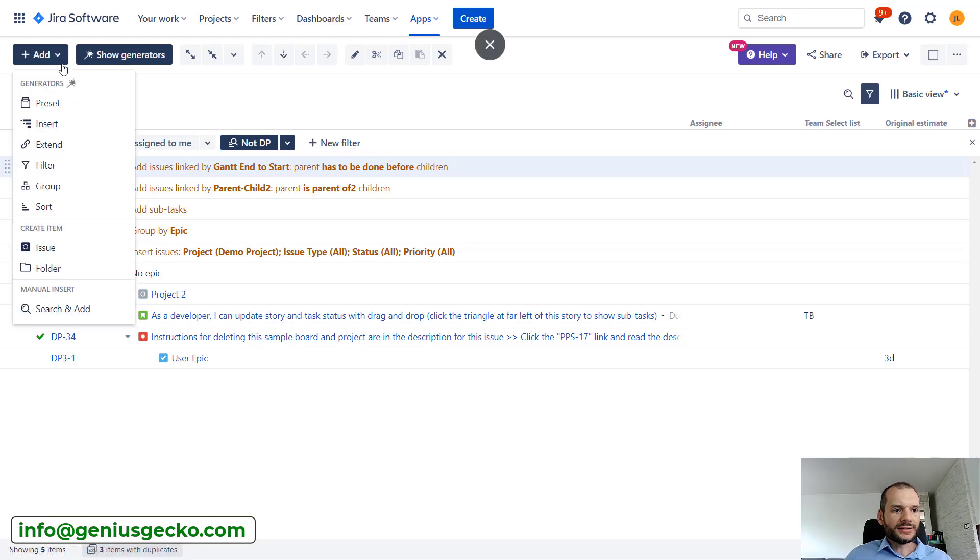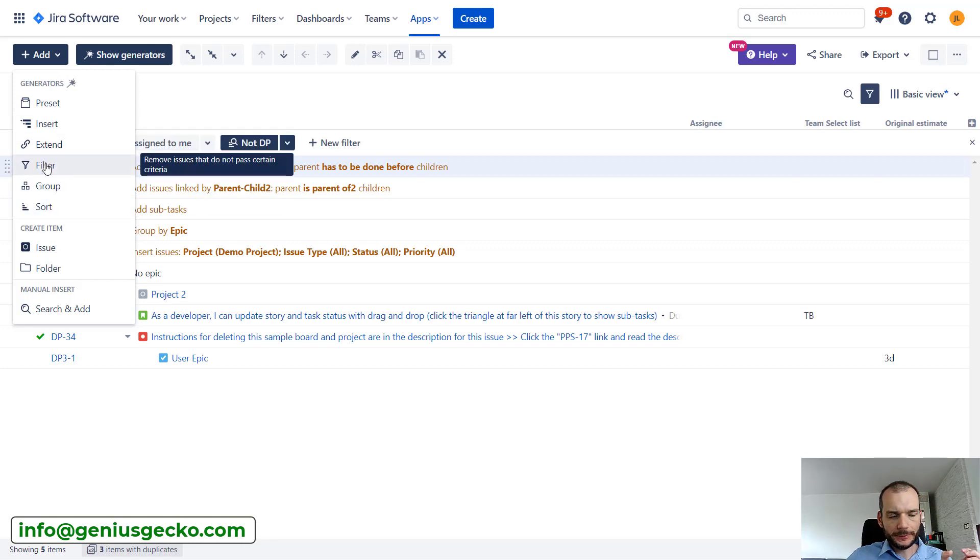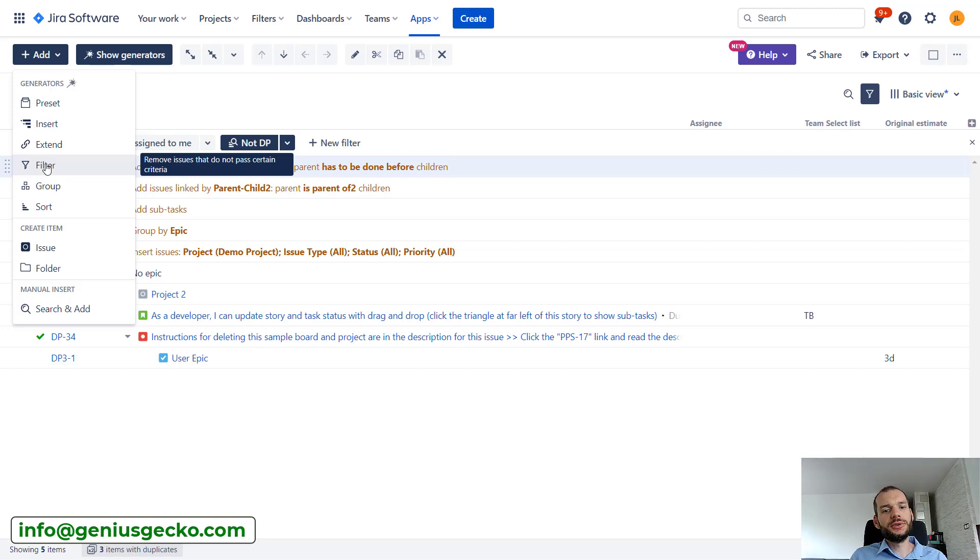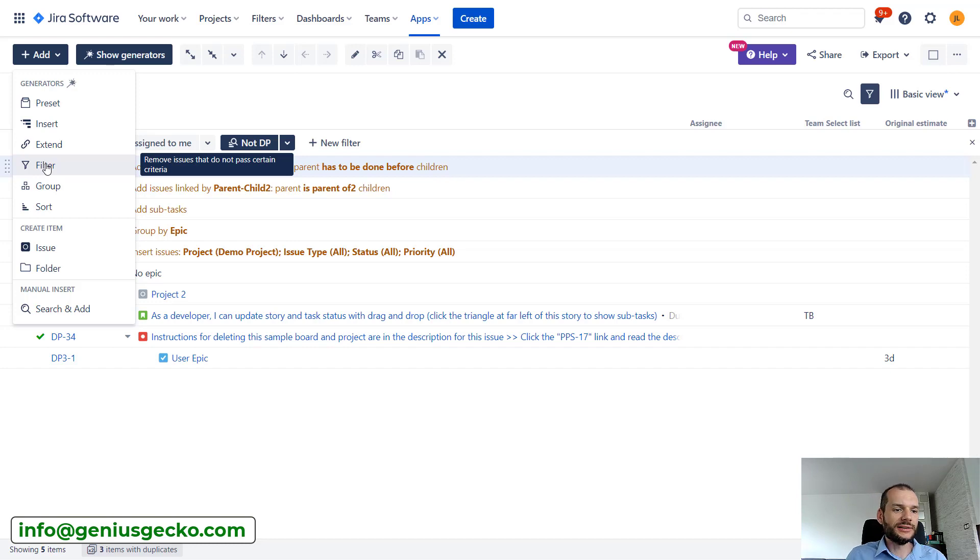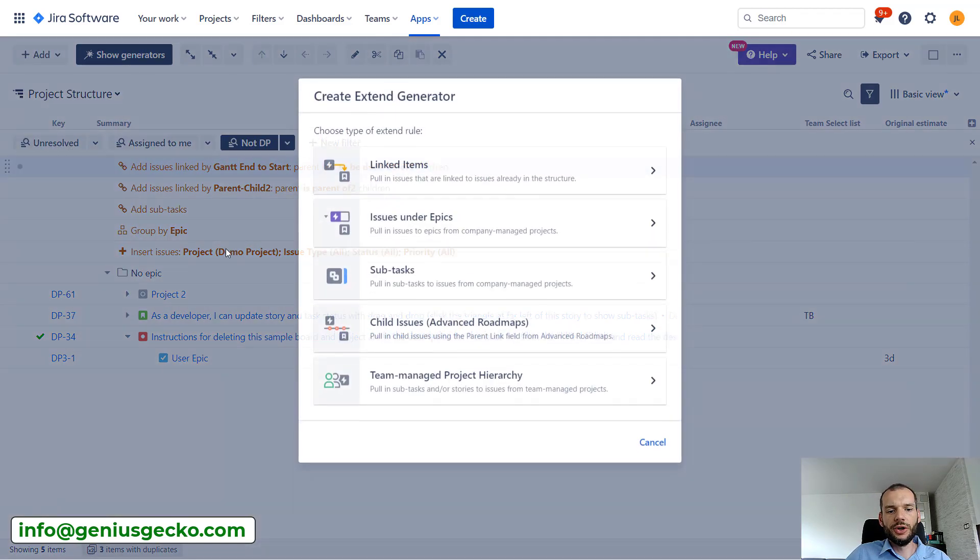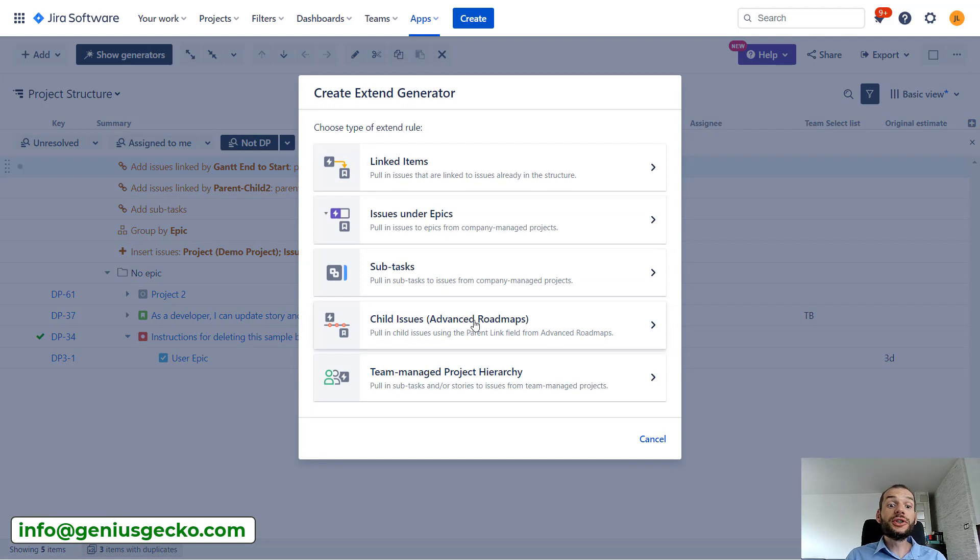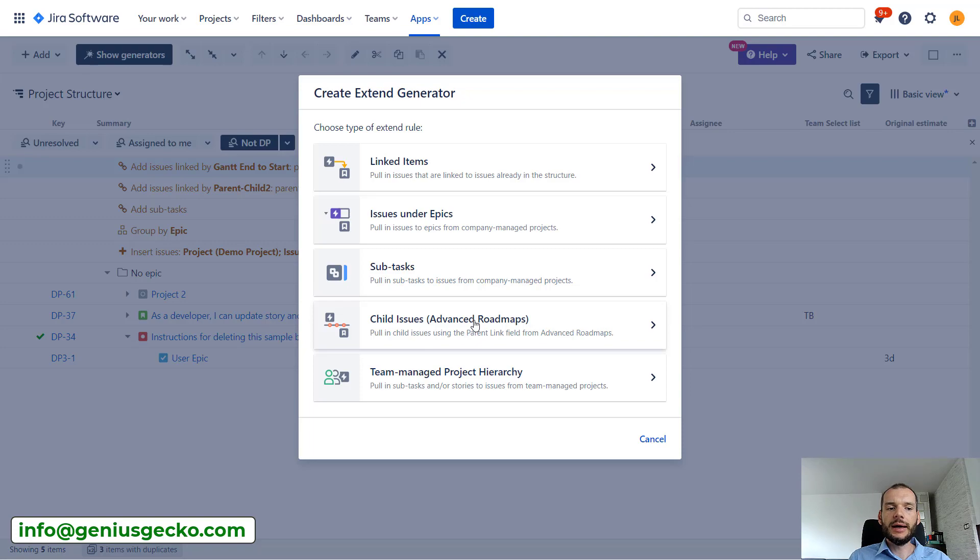All right, so we've already seen quite a lot. I won't be going into sorting and filtering, but we've already seen that we can basically create hierarchy based on fields available on the issue. So we could build hierarchy based on the status field, based on the epic field, or on the parent field when it comes to advanced roadmaps. But also we can build hierarchy on normal issue links between two Jira issues, which is very flexible and very powerful approach.